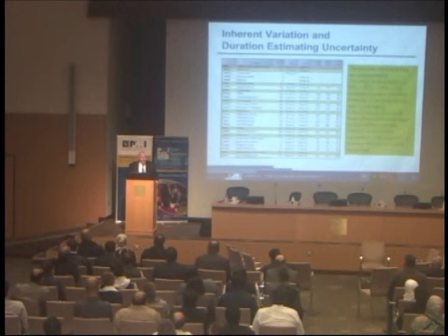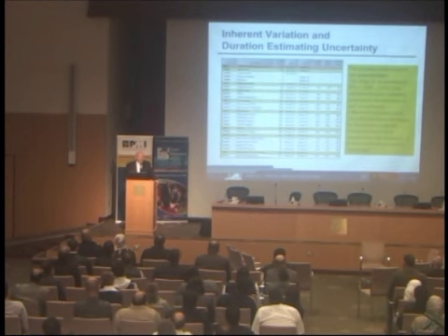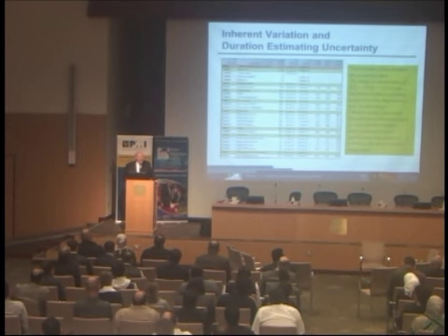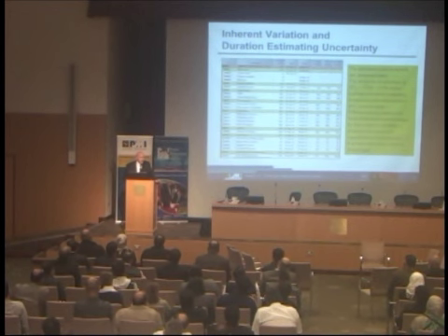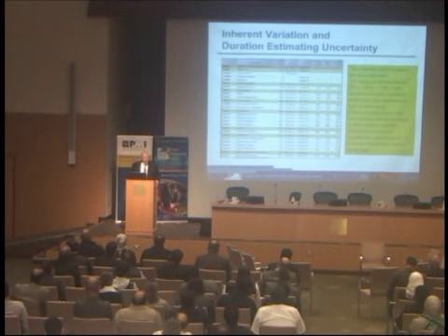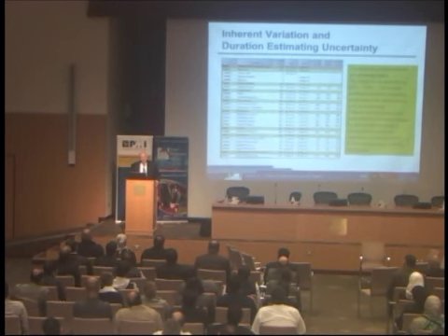And therefore, in the risk analysis, you may have a reason for showing that there's bias in the schedule duration, and if that's persistent and pervasive across all activities, then you might say, aha, I'll grind that into the three-point estimate. So you might have a three-point estimate that represents inherent variability and estimating error. That's 100% likely to happen throughout the project. So a three-point estimate is not a bad idea, 100% likely.